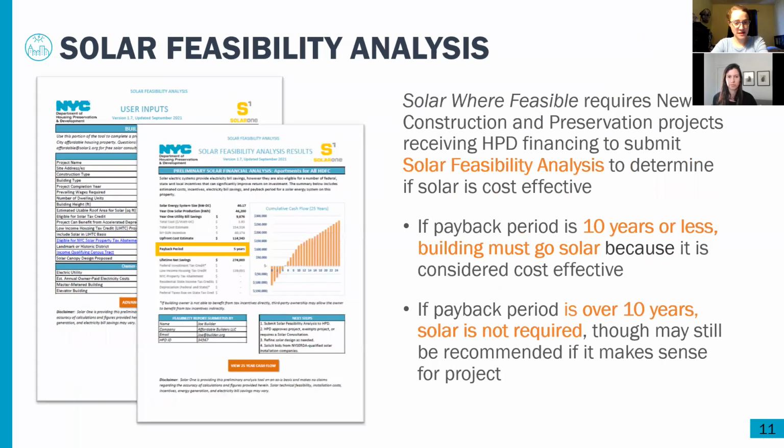So the solar feasibility analysis is a free tool that anyone can use for any type of building, but it's particularly designed for HPD projects, developments. If you fill in the feasibility analysis and look at the results, if the payback period, which is shown in that yellow box there, is 10 years or less, then solar is required to be included in the scope because it's cost effective and beneficial for the building.